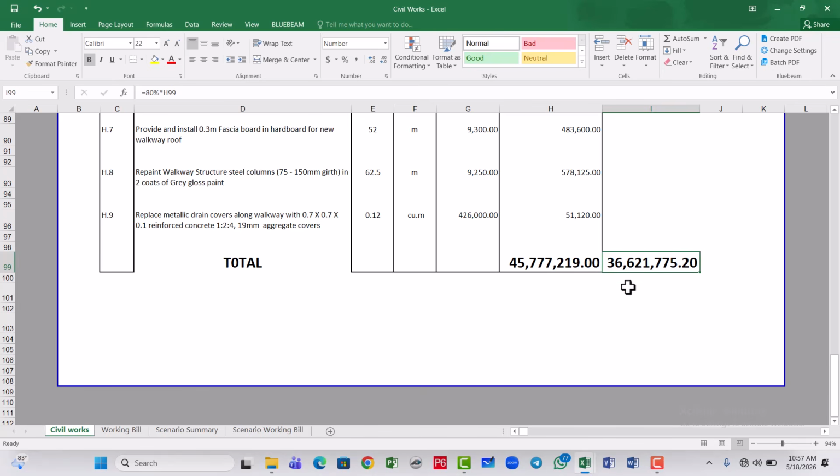Now, you remember that for every contractor going into any kind of project, the sole aim or goal is profit making. So he is going to be charging for profit and overhead. Let's say he's going to be leaving another 20% for his company, for overhead and profit. So we remove another 20%, because at this point, this is our new contract sum.